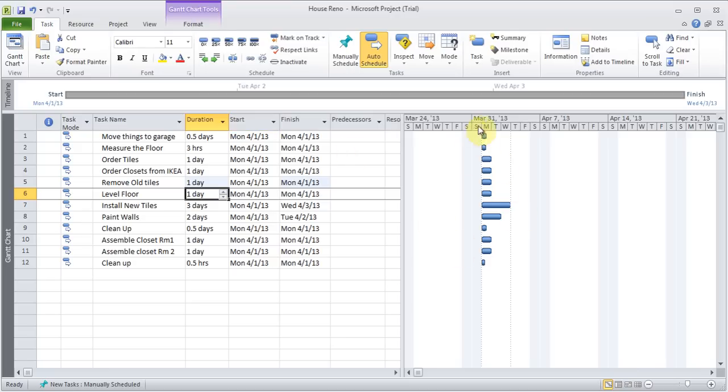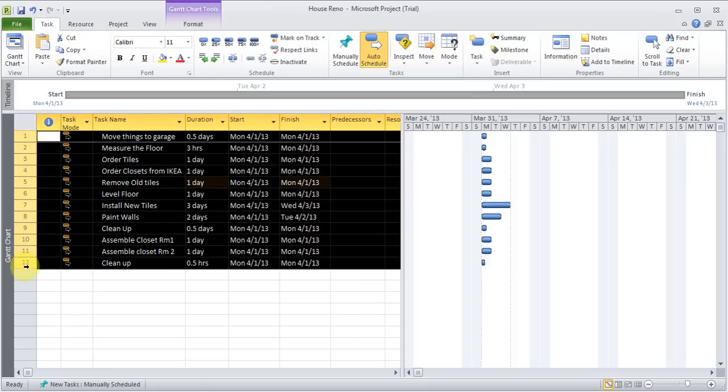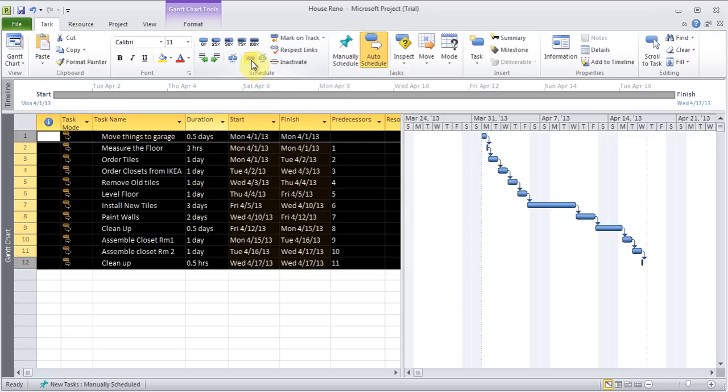And it shows me March, which is the 31st, and this is the 1st. It always starts on a Monday and then goes on. So I'm just going to highlight all of these jobs, go to the corner, highlight, and I'm going to link them. As soon as I link them, you see how it changed. Now the job's ending somewhere around April 15th, because it's saying finish the previous job and then you can start the new job. So they use the word predecessor, which is the previous job, and successor is the one afterwards. So that's the wording they use.